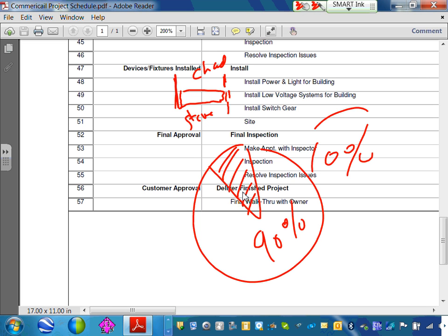And you know what the general contractor cares about? It cares about the start and finish of you. He gave you a slot of time. You have to start and finish within this slot of time every week. You can't go more or less, because if you go more, guess what? You screwed up the mechanical contractor. If you go less than the time, that's fine. You finished ahead of time, you go home. But if they give you 1 week to finish the rough-in, and you took 2 weeks, guess what? The mechanical contractor is behind a week. They'll be mad at you.